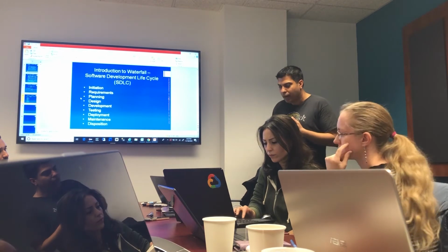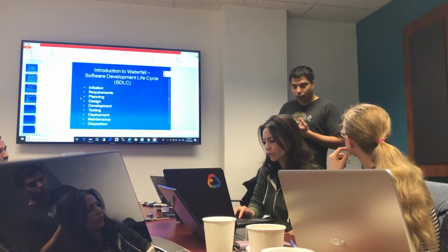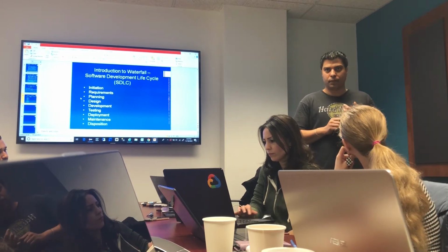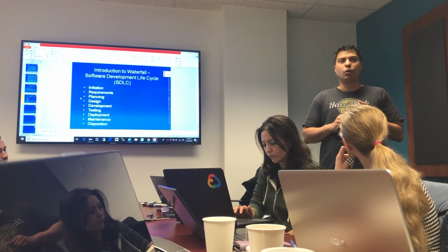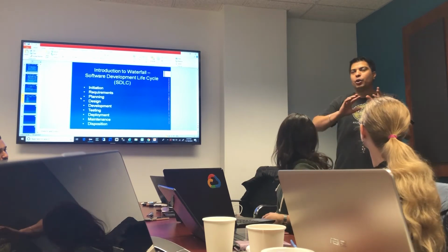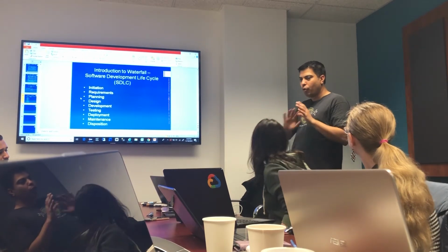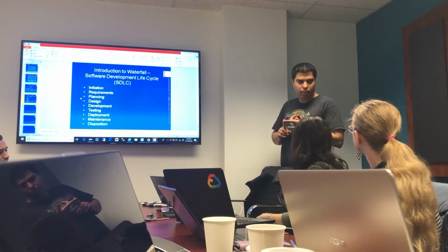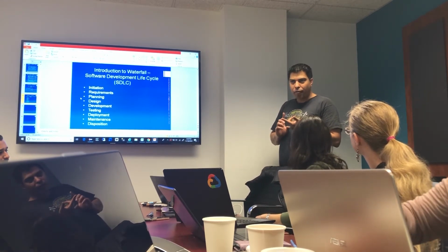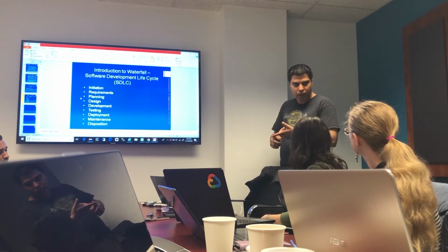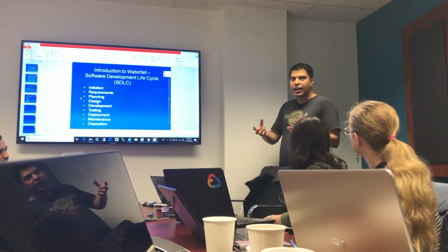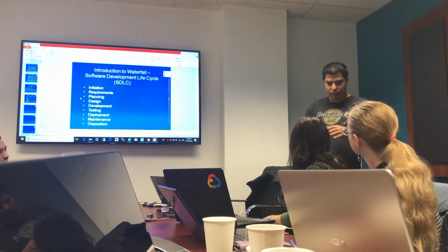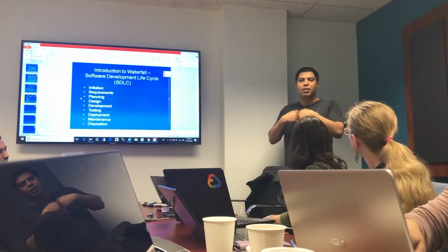So like we have the BRD review, we have a review of UI mockups. All the stakeholders review. Now, let me explain to you how these reviews happen. Going forward, UI mockups are reviewed the same way the BRD is reviewed. The FRD is reviewed the same way the BRD is reviewed. Everybody gets a chance to review them for a week. Every team member, and then they have a review meeting.